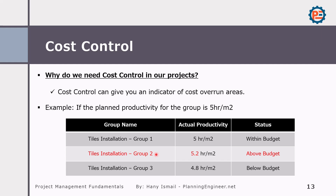Another benefit of cost control is monitoring the productivity of groups. Here we have three groups all doing tiles installation. We monitored the actual productivity and found that group one needs five hours per square meter, group two took 5.2 hours per square meter, and group three took 4.8 hours per square meter. The planned productivity is five hours per square meter.